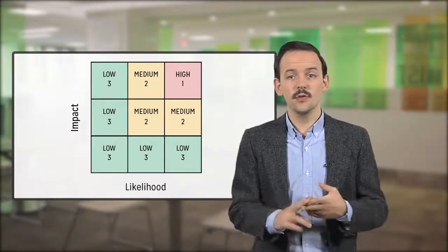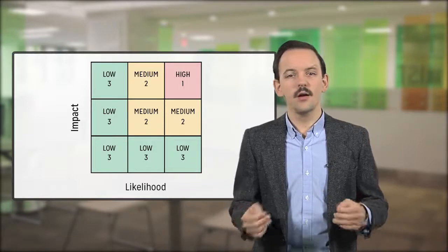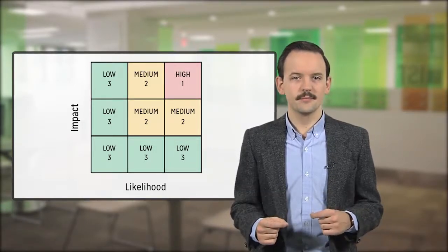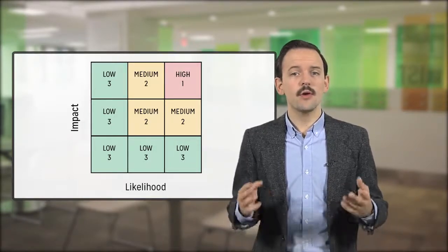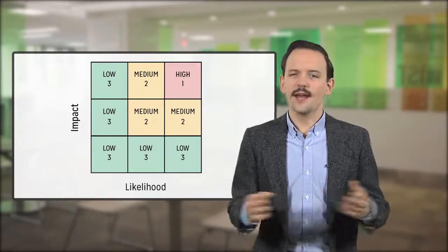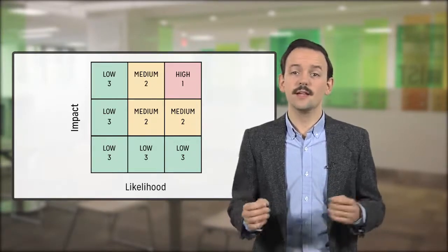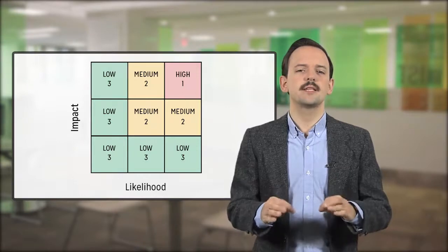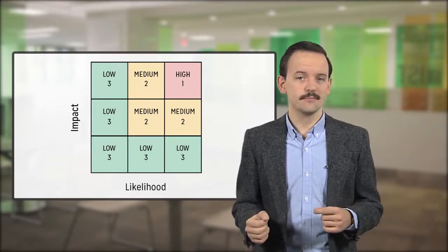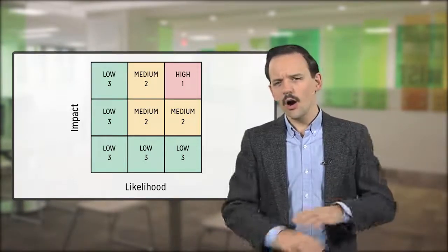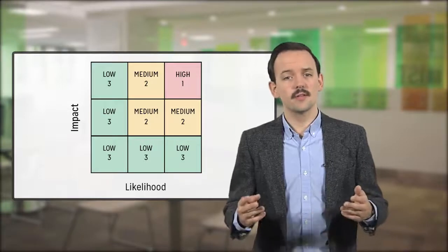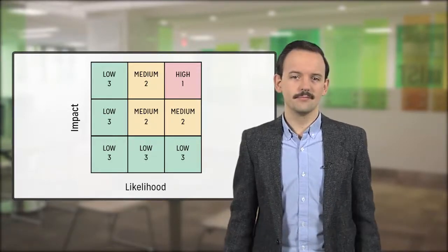Risks placed in the 2 category are less severe, but are still placed in your risk plan. These risks pose a moderate threat to your project, so any actions that should be taken are planned seriously, but not to the same extent as Category 1 risks. Category 3 risks aren't planned much at all because they represent a low threat to your project.